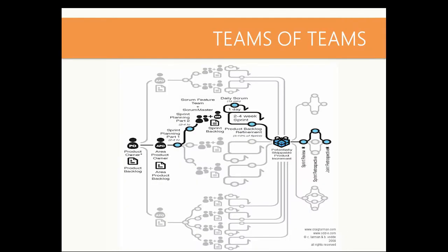You can't support that anymore with one single product owner. Yes, there is still one person overall responsible for the backlog, but he gets supported by, in this picture, 3 area product owners who own just one part of the full solution. After that, the picture is the same as on the previous slide. Sprint planning is split up over the teams who work on one component.